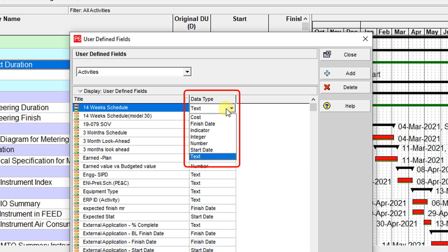Text, start date, number, integer, indicator, finish date, and cost. You should select the appropriate data type for your information. Because if you select an inappropriate data type, then in the future you cannot use your user-defined field very well.